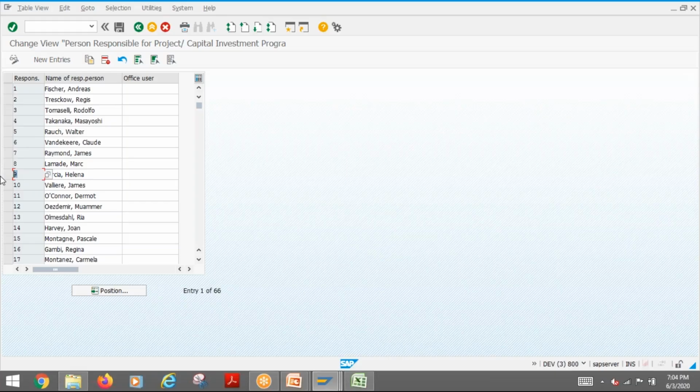For example, say different teams are working in a project. Let's say civil related, mechanical related, electrical related, something like that in a construction area. If I want to segregate them separately, and authorization can be separate, then this is one option you can use. So you say 1000 I will create as civil, 2000 as electrical, 3000 as mechanical. Then I just give a number. Then wherever 3000 comes, only the people from mechanical will be able to access. That way you can control it. Okay, that is one option.